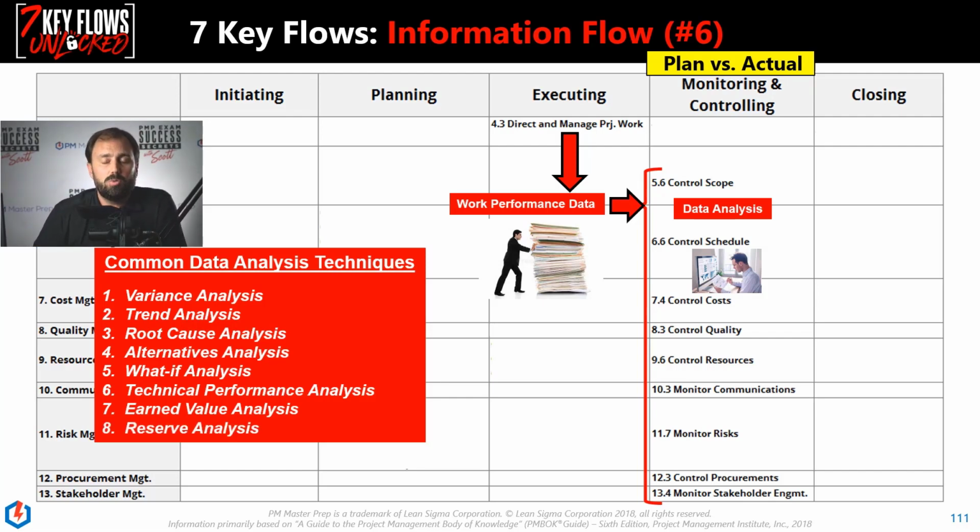Or we could look at reserve analysis. Remember in risk, we said the known-unknown risks, we have contingency reserves against those. How much of that money have we spent? How many risks have we realized? And the management reserves, for unknown risks, how much of that have we spent? So we've got to look at those. All those things bring understanding. Aha, we might say. Now, wait till you see the aha guy. Boom! That aha guy's like, I can't believe it. You guys figured this stuff out.